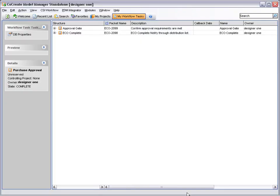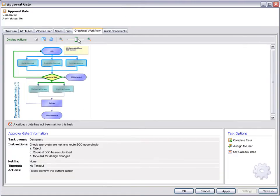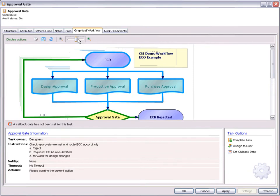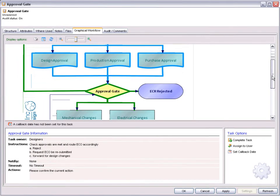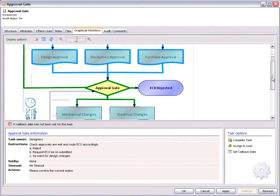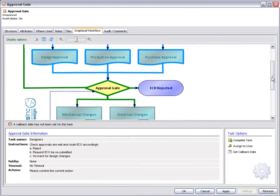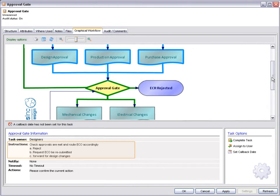Approvals are complete and the process reaches an approval gate where approvals are checked to determine the route forward. Here the change request can be rejected, returned to the originator for more information or moved forward for actioning.